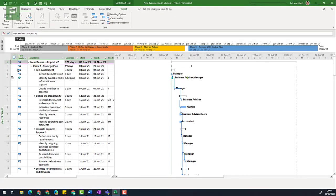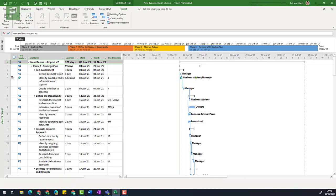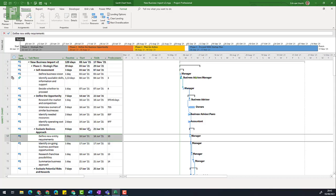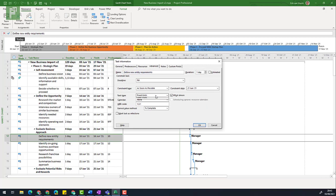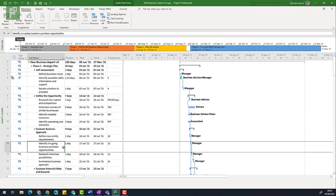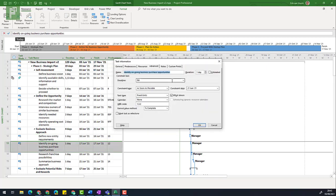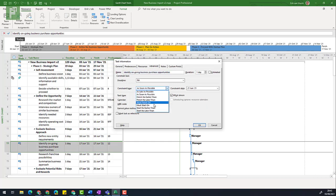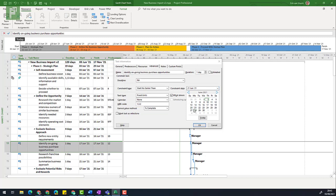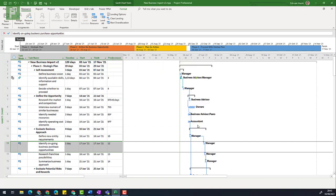So what we have here is we have a schedule. It has a deadline, it has a baseline, it has multiple task modes, it has a different calendar in there, and it has tasks with lag. It has tasks with start to start, finish to finish, start to finish - all the different kinds of dependencies that you would normally see. I can also add a different task type. And I can have a constraint date, for instance, start no earlier then. I'll do that two weeks after.